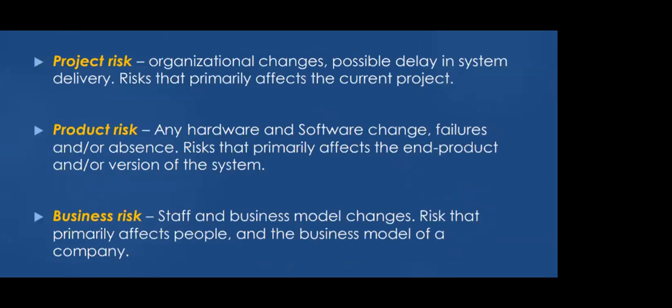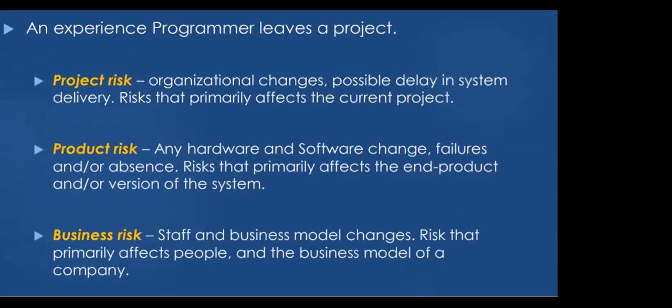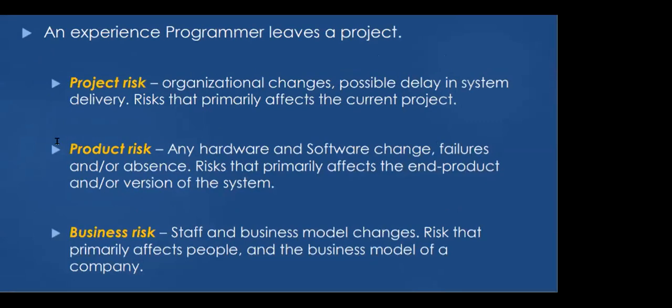Let's say that this September you want to release a mobile application and you want to support some functionalities there, such as chat among the users. Somehow you come to the conclusion that that feature is not going to be supported when you release the software. This affects your product as a product risk, because a feature that you originally planned is not going to be placed in your product, hence it will be affected.